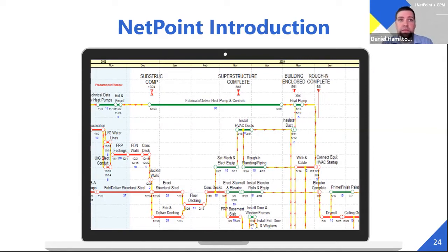It's a tool that allowed us to facilitate a full electronic interactive planning session that can be done completely in a virtual setting. This allows our participants to focus on discussing deliverables and logic without the need of wall charts, banners, sticky notes, and inconclusive logic ties. This method also provides instantaneous feedback to the team as they can see live logic and duration impacts on the project. And when you move an activity or increase an activity's duration, it impacts the overall schedule timeline immediately.